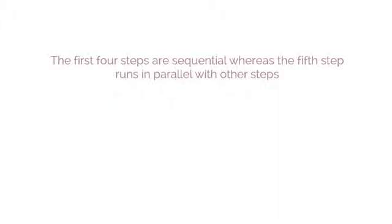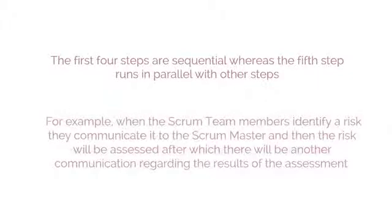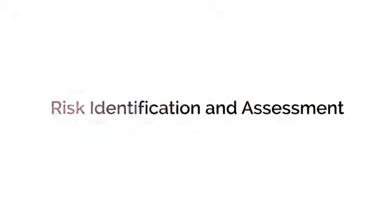For example, when the Scrum team members identify a risk, they communicate it to the Scrum Master, and then the risk will be assessed, after which there will be another communication regarding the results of the assessment. Now let's look at the first step: risk identification.